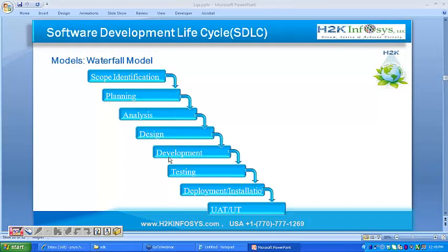So she will come to us and she will give the change for us. Okay, so she needs a new type of kitchen. She will give this change requirement for us. But if we are following the waterfall model, we will not be able to accept the change. She has to adjust with whatever we are making for her, right? So this is nothing but the waterfall model's drawback.